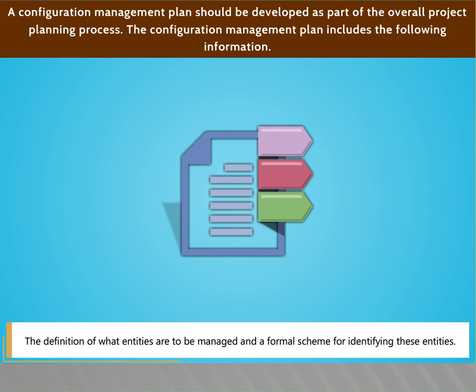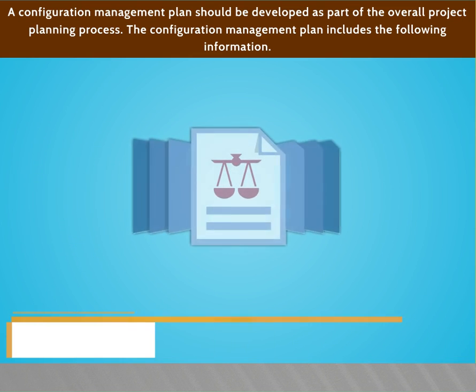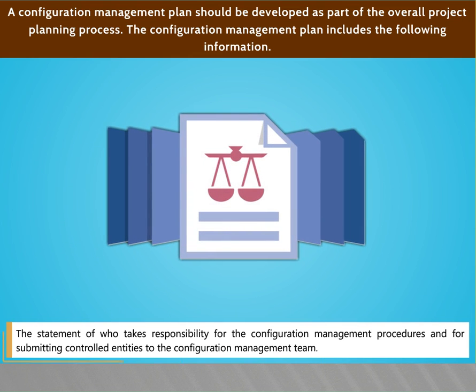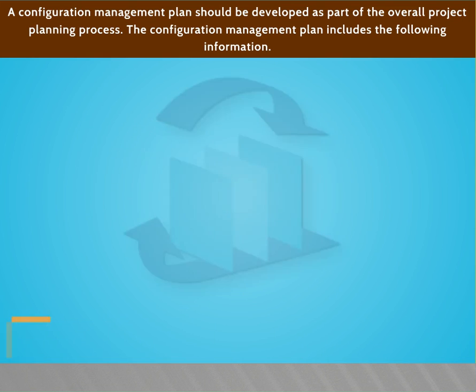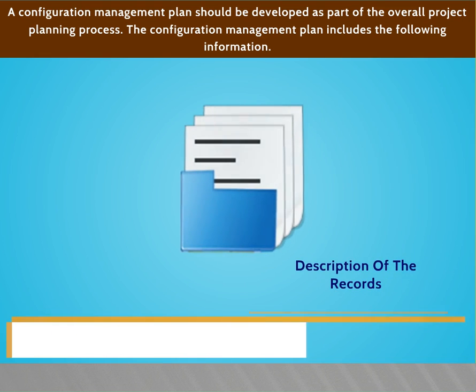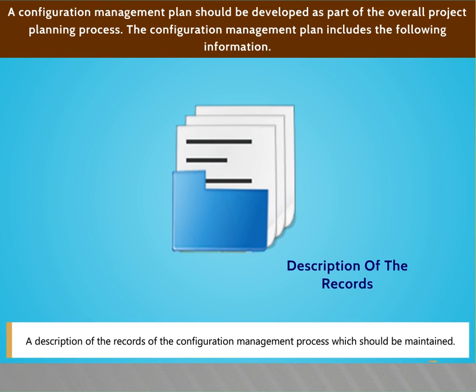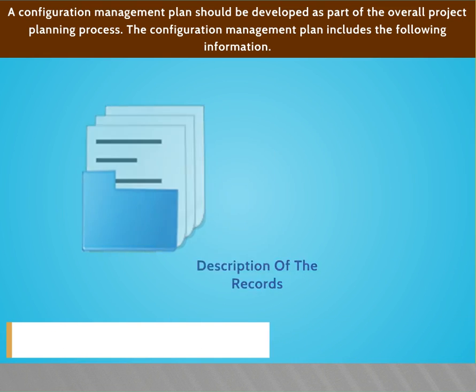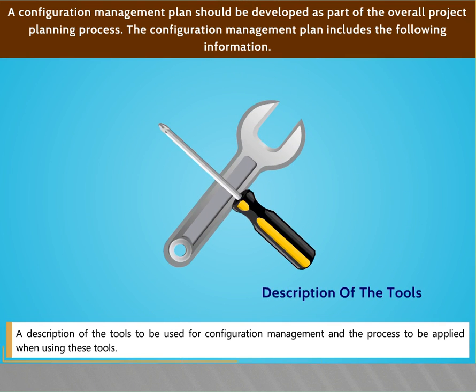The definition of what entities are to be managed and a formal scheme for identifying these entities. The statement of who takes responsibility for the configuration management procedures and for submitting controlled entities to the configuration management team. The configuration management policies which are used for change control and version management. A description of the records of the configuration management process which should be maintained. A description of the tools to be used for configuration management and the process to be applied when using these tools.